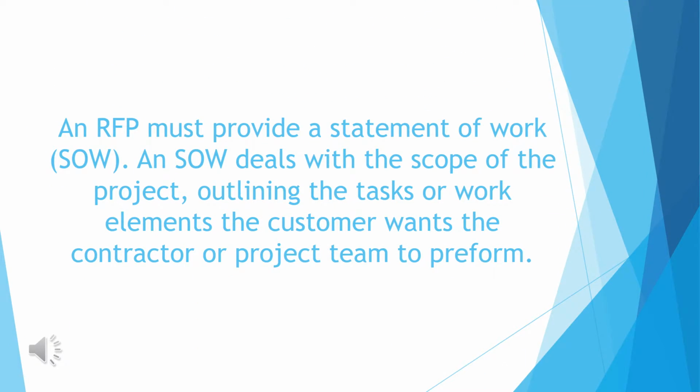An RFP must provide a statement of work, SOW. An SOW deals with the scope of the project, outlining the tasks or work elements the customer wants the contractor or project team to perform.